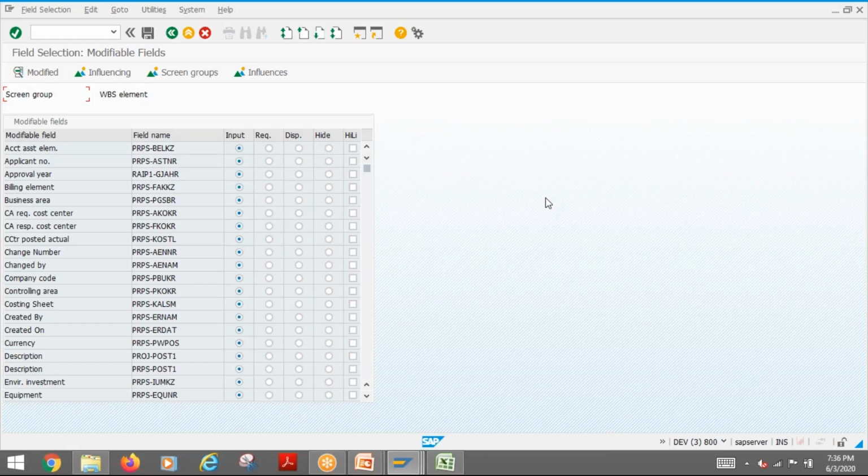Got it. But anyhow, I'll try that. Yes, if you put a wrong number, if you look at it, there is nothing wrong, but as per our logic, it is not matching the level. Then it will give you an error message if you derive the structure. For example, your superior is supposed to be level 4 as per the numbering, but you consider the level as 2. Then the system will give you an error saying that the superior is not matching. So you need to adjust it. You have to go to the graphic and put it properly, or cut short the number.